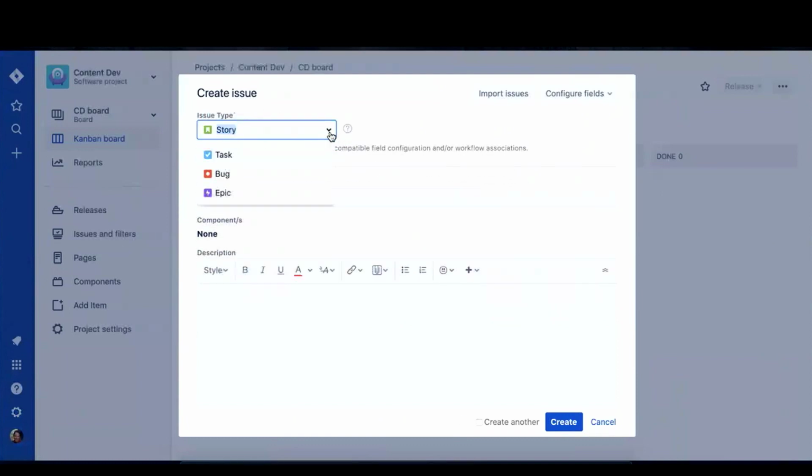Since we've created a project for an entire segment of the business, every epic should be a project. In this case, an epic will be this particular conference event, the epic EOS World X. So we will select epic. For your first issue, if you have a project in mind, an epic is the way to go. It should encase everything else.